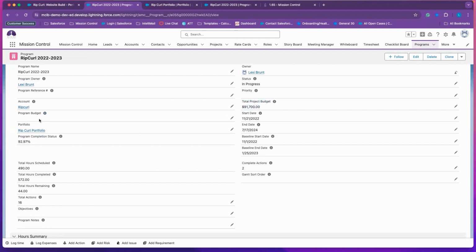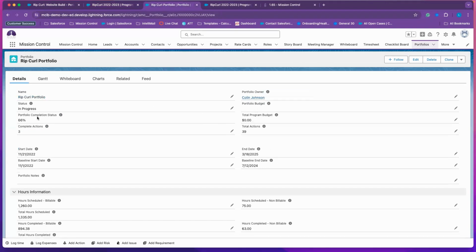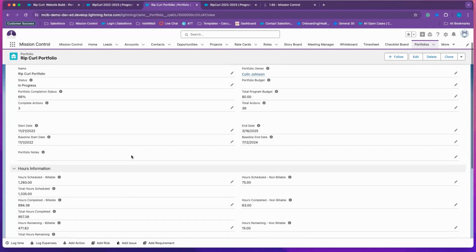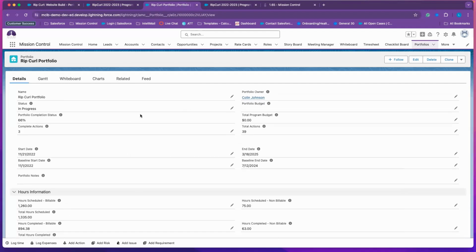I would manually set this on my program budget, and then we'll get a figure of if we're over or under budget. So if I was to set my portfolio as 100,000, and then the values start to roll up and I'm over 100,000, that just means that I under budgeted. I didn't assume that we were going to have the correct budget.